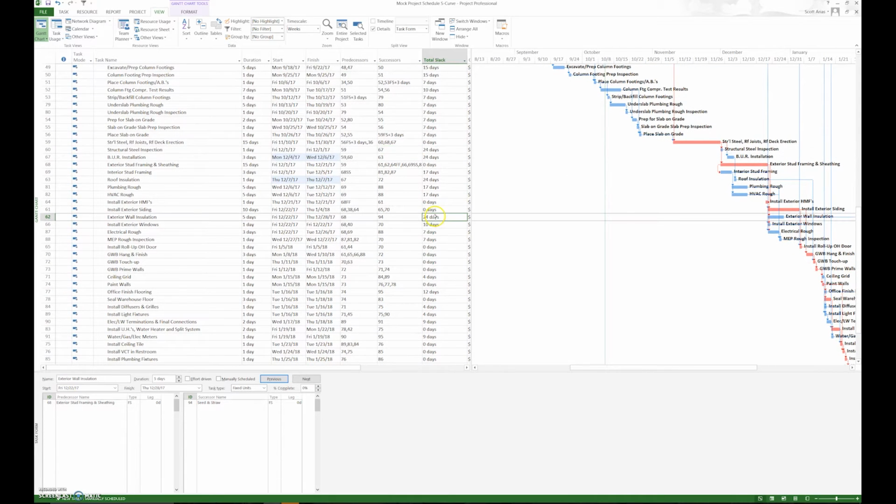Here's another one here. Exterior wall insulation. And it says that seed and straw is a natural successor. And, without having the drawings informing me, I couldn't tell that to be the case. But number one, that doesn't seem like a logical relationship. So we probably want to have the insulation before we do things like hang drywall. So if we go ahead and put, instead of 94, we put 70 and reduce that 24 down to 6.